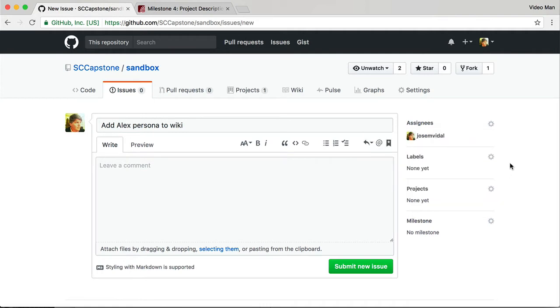As a rule, you want to have at most one person assigned to each issue. Because if you have two people, then it's not clear who's going to do it. It's fine to have 0 people assigned. That just means that we haven't decided who's going to do this. But it has to get done. So at most one person assigned to each issue. Try to go for that.